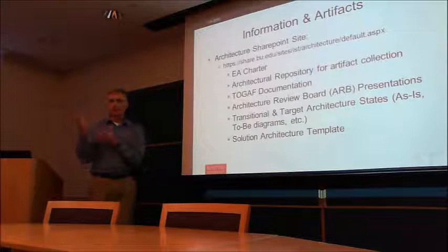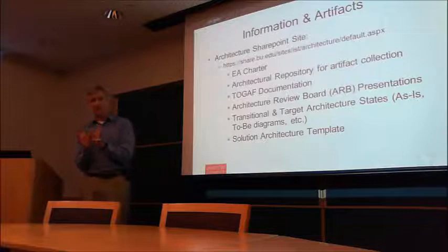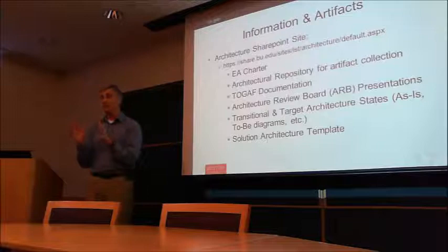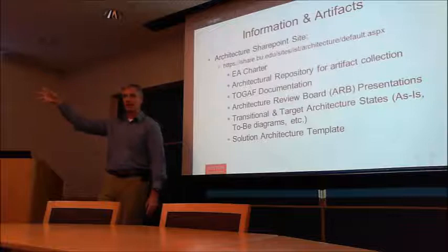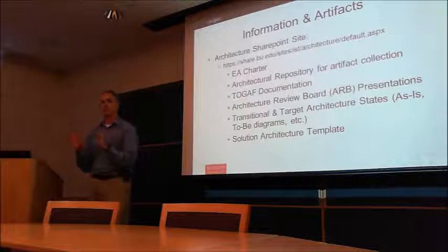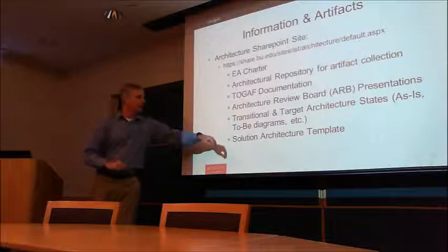Housing was a big one. Housing is a series of components on the mainframe and how they integrated with all the other components. When Ryan created a diagram of all of the dependencies, it was pretty overwhelming. It really surprised some people, right? It was like, whoa. It's not just a matter of implementing a piece of shrink wrap software, configuring it, and then going. No, it's all that plus setting up all the integration, making sure that we're looking at these solutions that we're implementing. We use existing tools like our single sign-on solution, web logging, whatever it may be, right? So we're constantly looking at this stuff.